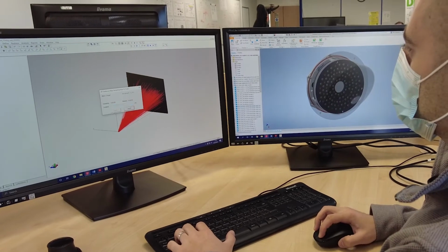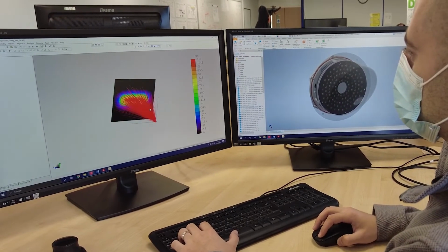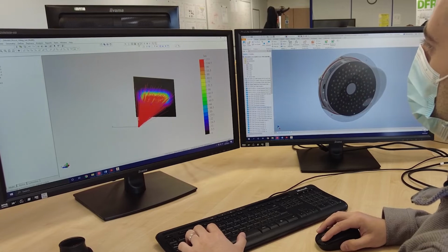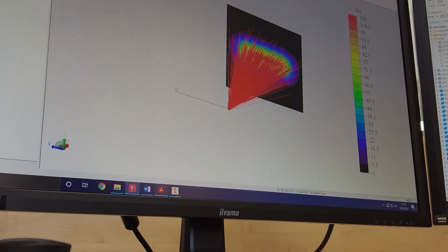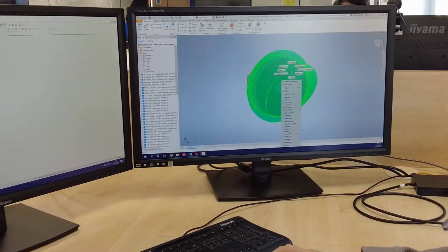So the engineering team here in Southport at Unipart Dorman realised that going through that process 1, 2 or 3 times is costly but also time consuming, because each of these parts that we have to manufacture is custom and there's a lead time on doing that. So they researched in the market to see whether there were simulation tools for optical design, because we already use digital tools and techniques for our mechanical and our electronic circuit design, but we didn't use that for optical design. The optics is the biggest driver. That's the biggest thing that we have to change and going through that prototype process.